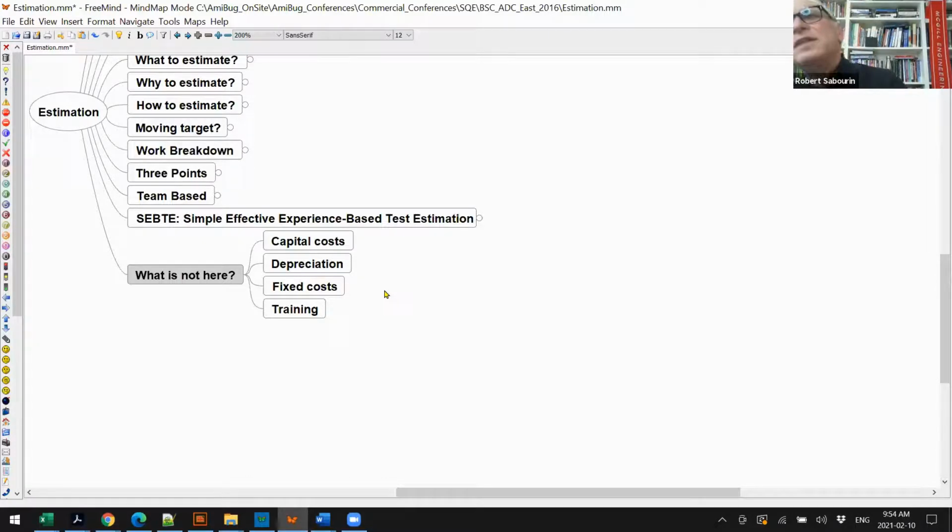The other point is what about the scoping issues on projects. So task-oriented things, if you change the scope, you're going to change the tasks. So you really have to redo the work breakdown. And that's the reality of it. However, if it's before the project starts, you can use zero information methods, as I mentioned. But if you're in progress and the scope is changing in the middle, you really got to say, okay, that means my list of activities has changed. And some of the list of activities are similar to what they were before, some are not.